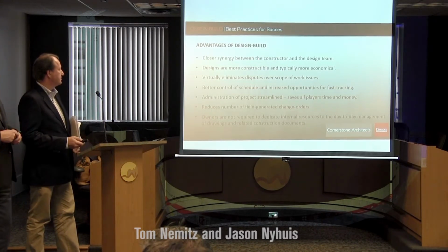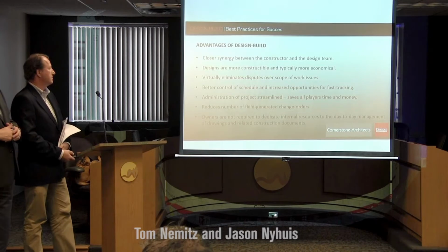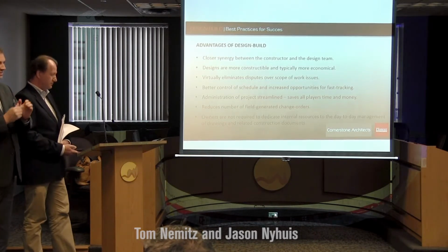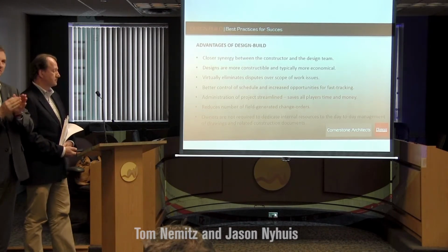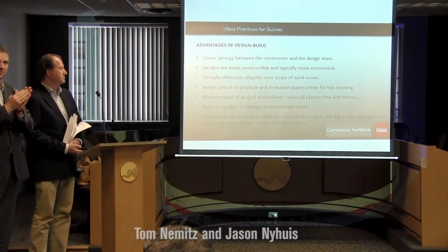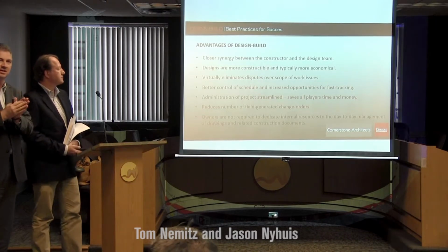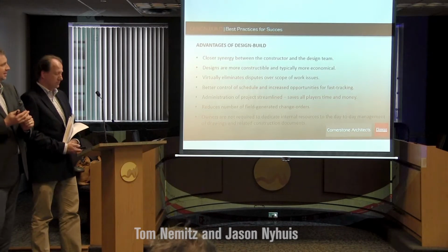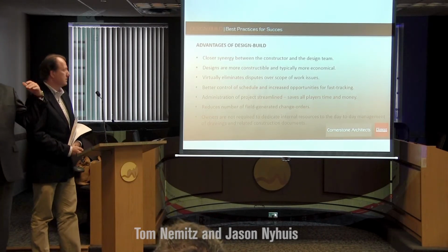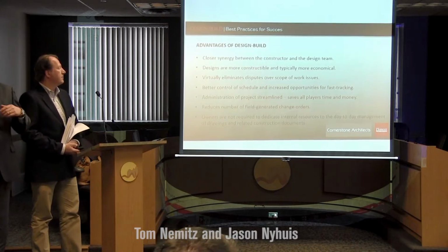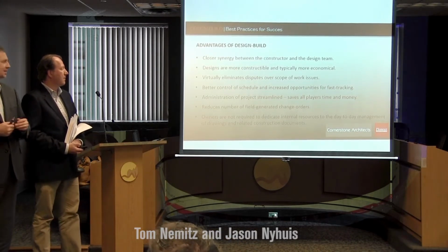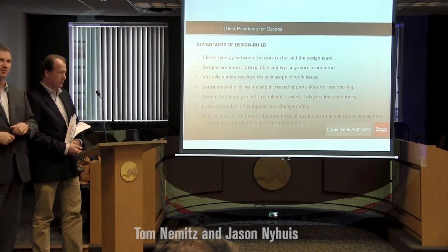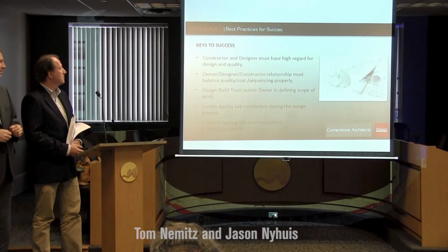So, a couple other things to note. You start getting into the schedule, the fast tracking. We talked a little bit about that at the beginning. What happens as you get into that is you're able to start on the construction portion a little bit quicker while some things are still being designed. There are some helpful hints to that, because sometimes the major hurdles you run into are, let's say, the soil bearing isn't quite what we need it to be, or we need to adjust some of the footings and foundations. As we're getting into that, we can make those adjustments as we're moving forward, and that will affect some of the balance of the design.